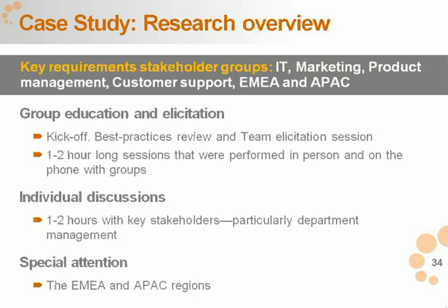With that, we spent a lot of time capturing requirements, what we would call elicitation sessions to elicit information from people. We started things off with best practices session, getting everyone level set, educating people as to the process, and then also a team elicitation session where everyone can come to the table and give us some of their hot button requirements. And then we started digging into the groups and the individual groups and their concerns, and finally individual stakeholders, some of the key management.